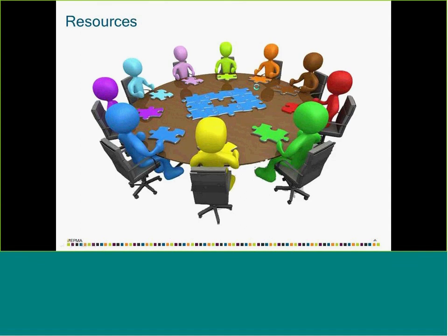Now, the key fields that you need to define when doing your resource pool is the maximum units, which basically determines the maximum availability of each resource. You need to define the calendars for these resources. Basically, any PTOs that they have, that affects the availability of your resources.